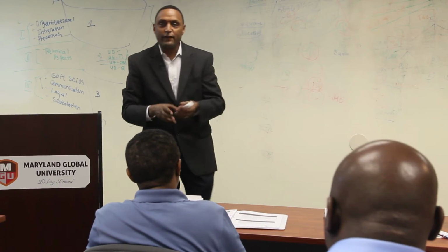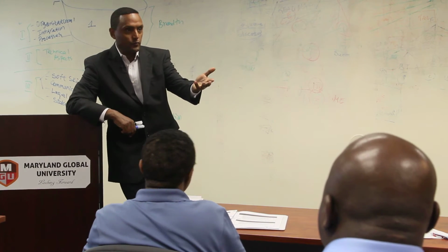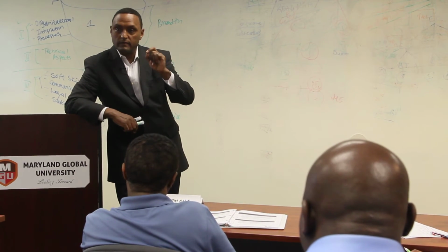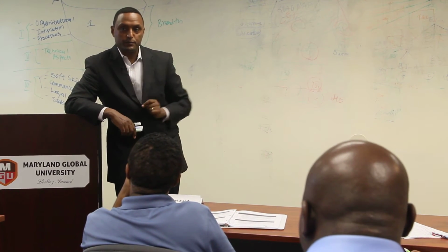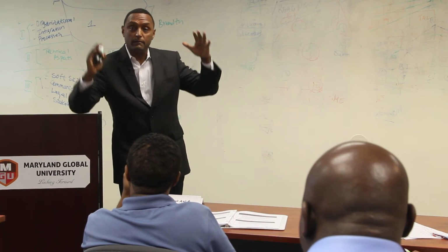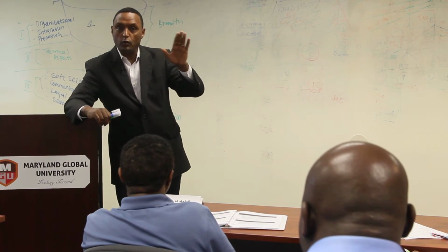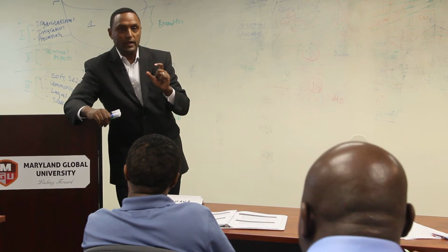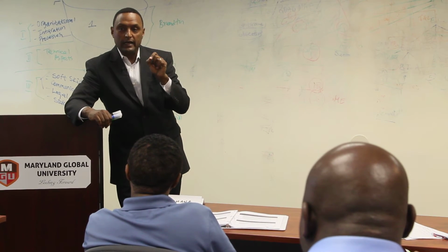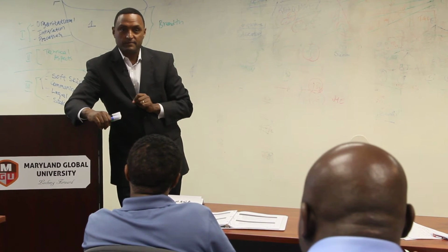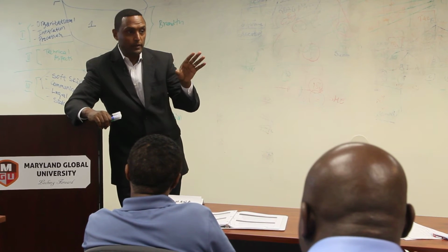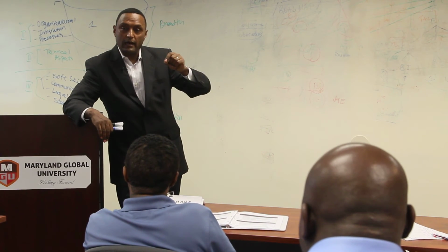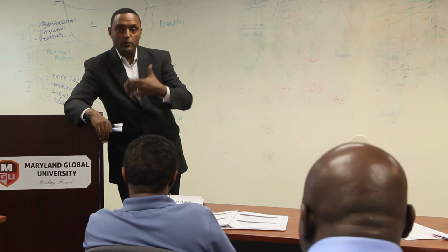Okay. What else? I mean, you're right. So scope means, if I ask you to build a 6-story apartment complex in Rockville or in Silver Spring, that is my high-level scope. Not 7, not 8. It's a 6. And if I tell you that I want you to finish this in 18 months, not 19 months, not 20 months, that's the scope.